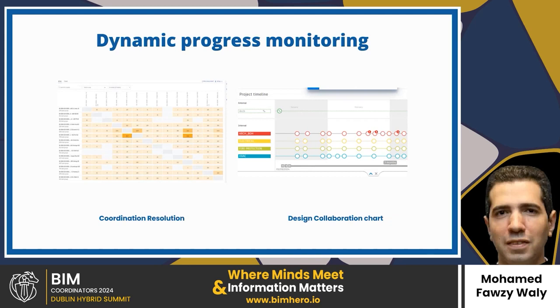While in the model coordination module, the clash detection process is enhanced by presenting clash results in a clash matrix. This matrix visually organizes clashes, helping users quickly identify problem areas across different model elements. The clash results are automatically updated as new models or packages are added, enabling teams to stay updated on coordination issues without having to manually refresh the data.